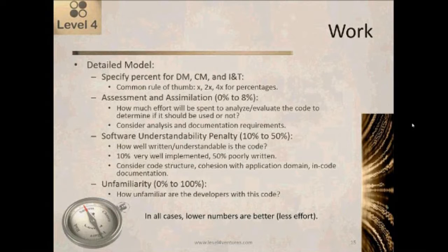And the inaccuracies that you would get that would be kind of smoothed out with a normal estimate, when I'm dealing with quantities of hundreds of something, those inaccuracies add up. And so the detail model will help me smooth out or get rid of those inaccuracies.